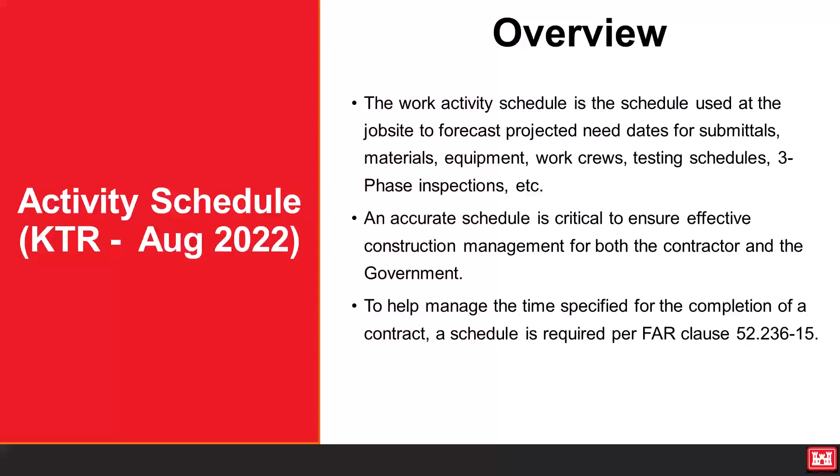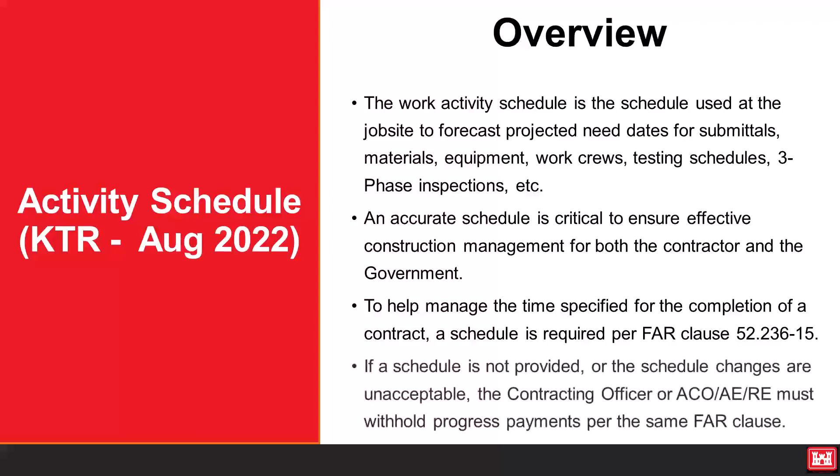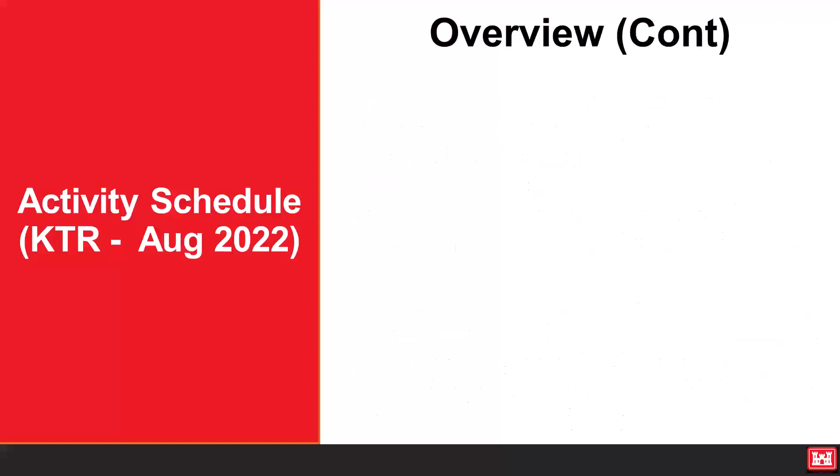If a schedule is not provided or the schedule changes are unacceptable, the contracting officer or ACO, AE, RE must withhold progress payments per the same FAR Clause.